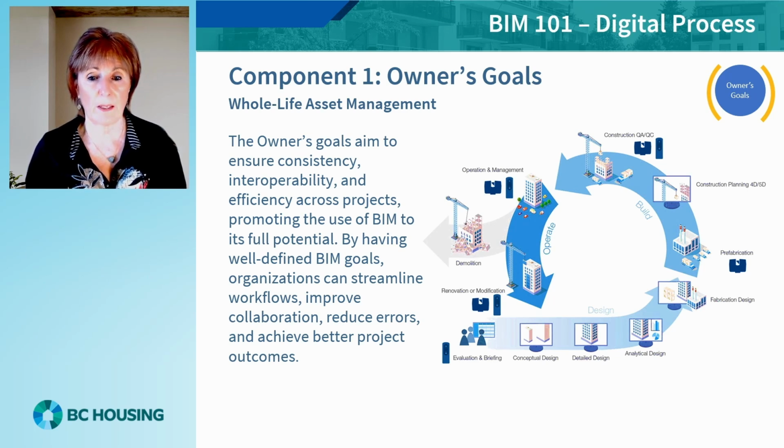So policy. It is the capital planning and facility management team's responsibility to define the BIM policy, the goals and uses for the data, typically specified in the BIM requirements specification. This is similar to how the owner team defines the facility program, setting out how the building is to perform and what is to be included. What, as an owner team, do you want the data to do for you during the design, construction, and operations lifecycle phase of the facility? What are the goals and uses?